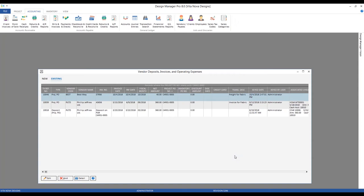You can have as many vendor invoices on a purchase order as necessary, particularly for shipping charges. Digging deeper into the detail, we can see we're appropriately hitting our freight cost of goods sold account, and we can even see the component affected was our freight component. We can see the original purchase order cost versus the cost to date from the vendor invoice, tying all freight charges precisely to the components they're associated with in the project.